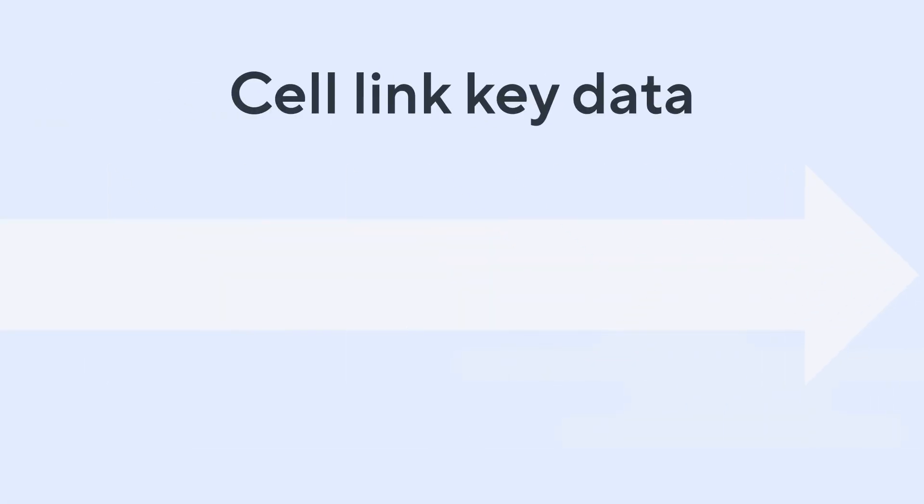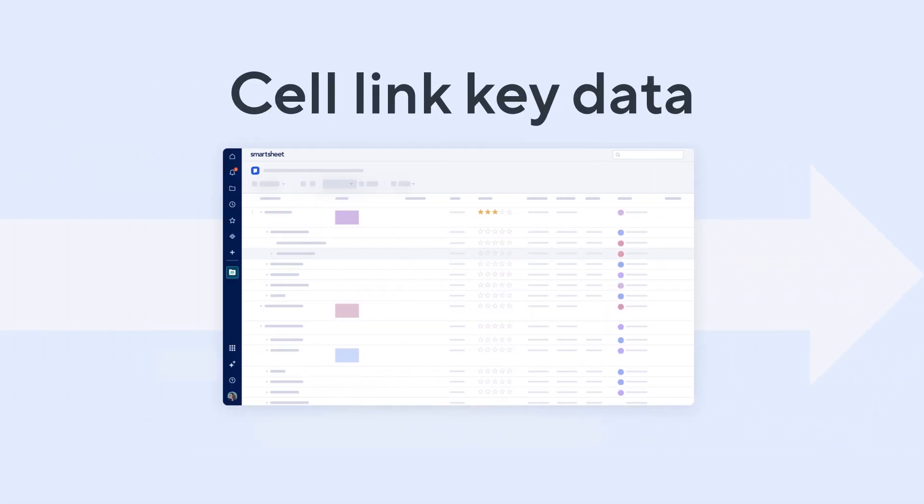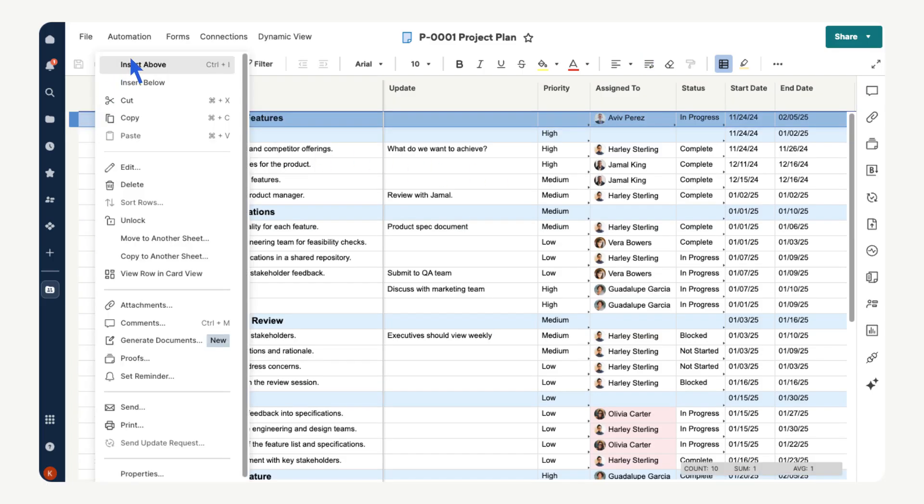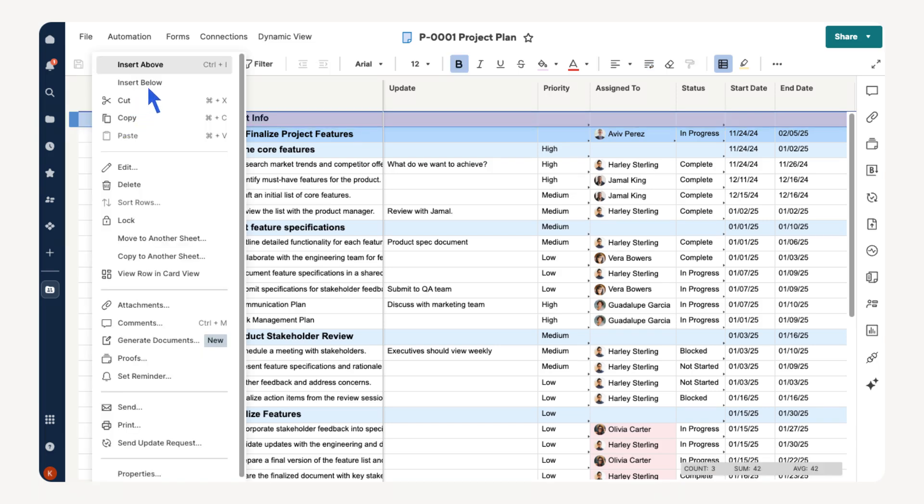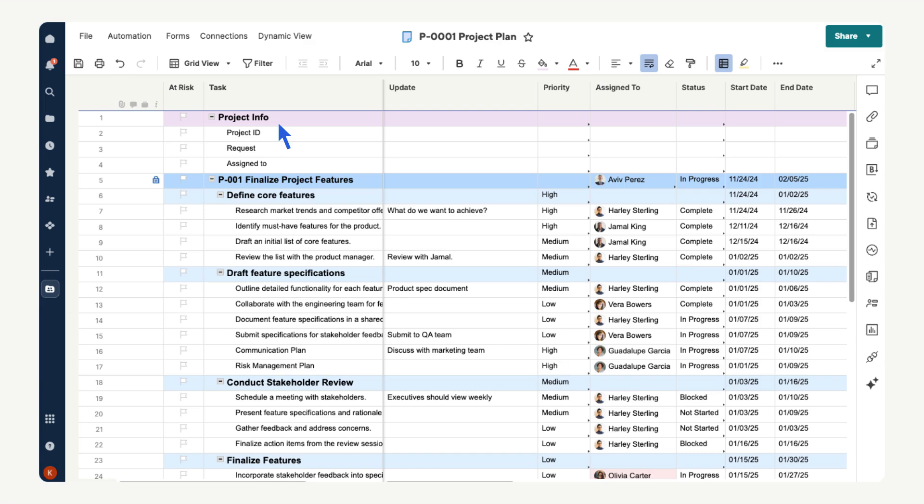Use cell linking to bring key data from your intake sheet to your project plan sheet. In your project plan sheet, start by adding a new row at the top of your sheet and naming it project info. Then let's add three child rows with the key data we want to pull in from the intake sheet.